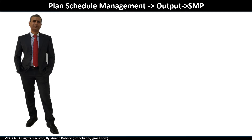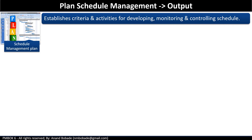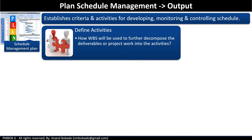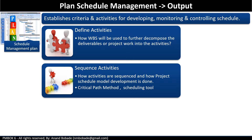There is only one output: the schedule management plan. It establishes criteria and activities for developing, monitoring, and controlling the project schedule. The plan explains how each process will be done. In define activities, it explains how the work breakdown structure will be used to further decompose deliverables into activities. In sequence activities, it explains how activities are sequenced and how project schedule model development is done. It also explains the scheduling methodology — such as critical path method — and scheduling tools like Microsoft Project to be used. Note that the term 'project schedule model' simply means the project schedule is not written in stone; it can be changed.